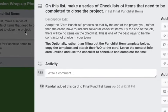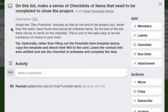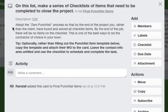One of the things that I advise you to do is adopt the zero punch list process so that at the end of the project you, rather than the client, have found and solved all checklist items. By the end of the job there will be no items on the checklist if you do this properly. This is one of the best ways to be the contractor of choice in your town.